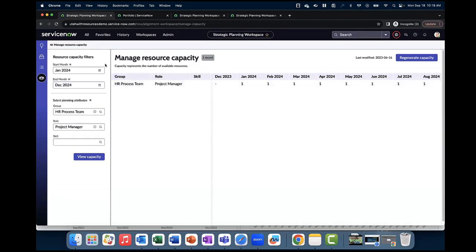Prior to this step, there should be employee profiles created for all resources with their relevant attributes like skills and roles assigned. This is a required step for capacity planning on a portfolio.